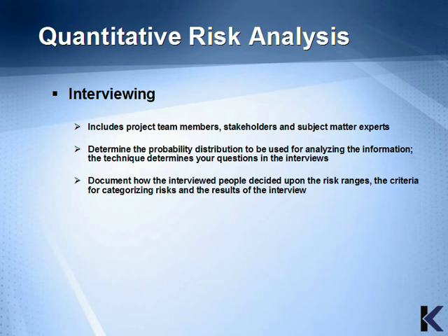We've talked about interviewing before. Remember, it includes project team members, stakeholders, and subject matter experts, and it's used to determine the probability distribution to be used for analyzing the information. The technique determines your questions in the interviews. You also want to document how the interviewed people decided upon the risk ranges, the criteria for categorizing risks, and the results of the interview.